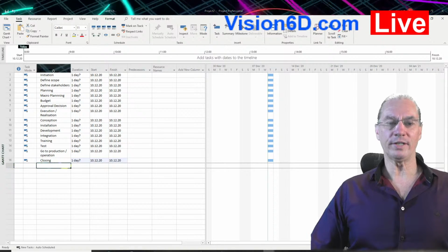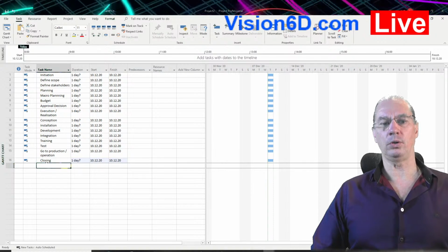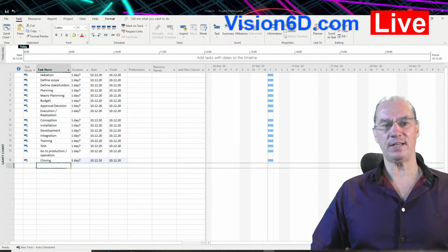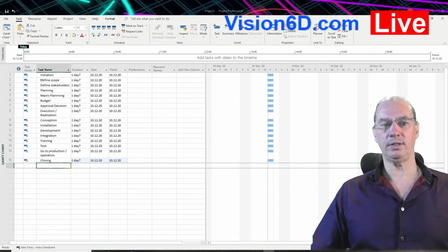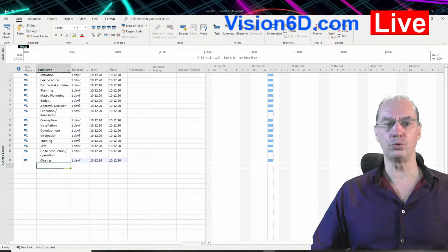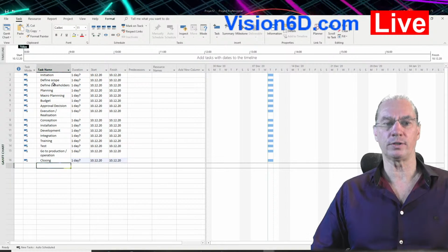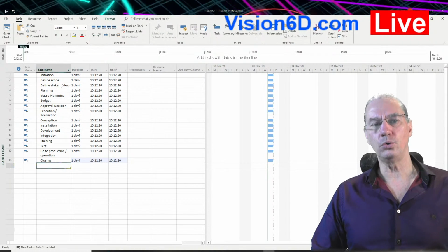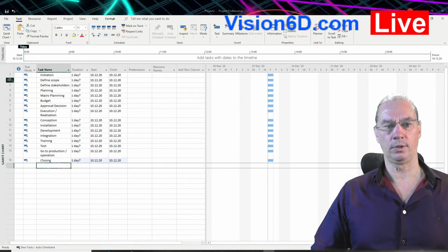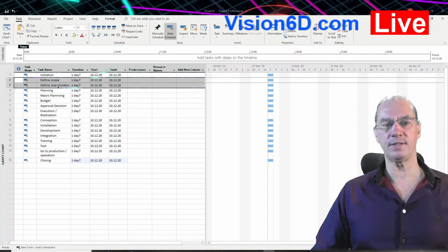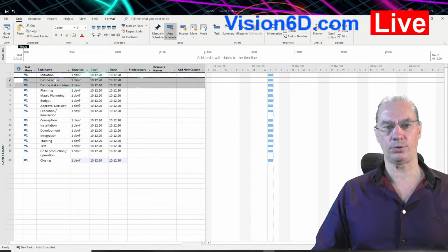So we are now at a stage where we should organize all that information a bit. So I've set up here initiation, you see, and within initiation we have two tasks which are define what we want to do in the project and for whom, and who are really the people who have influence on the project. So what I want to say is these are part of initiation. So I want to indent those tasks.